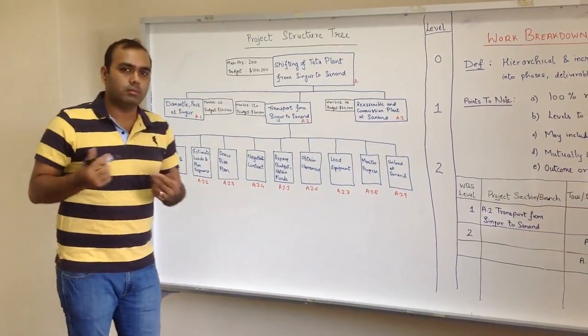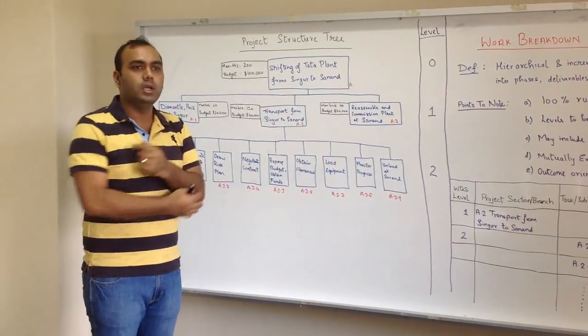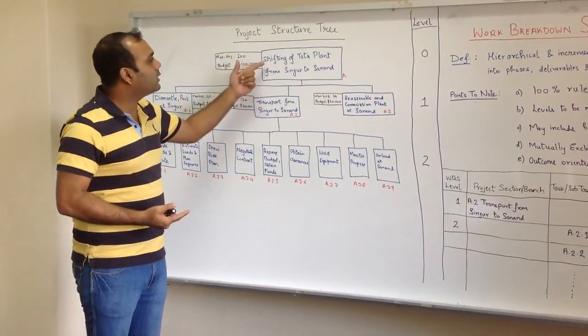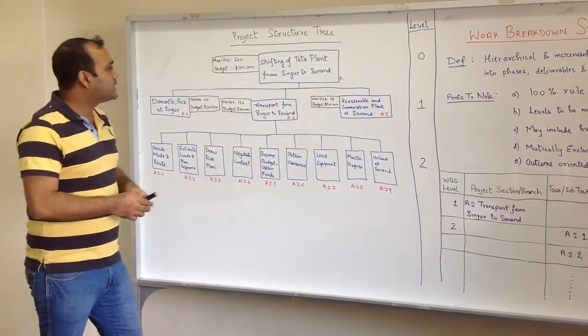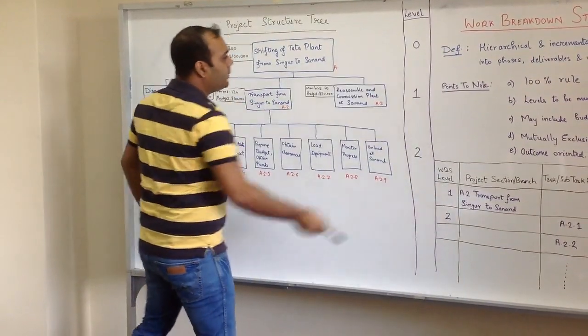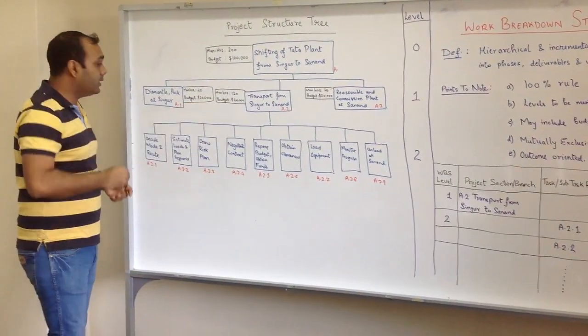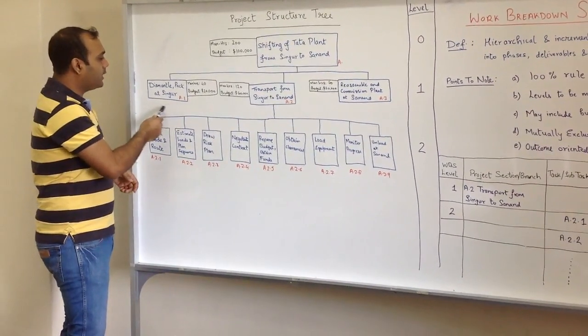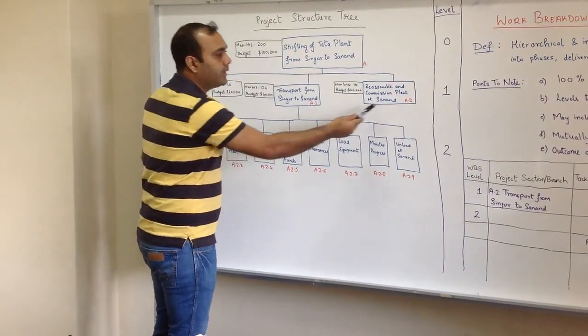Let's say the main deliverable of the project is shifting of a Tata plant from Singur to Sanand. You can see this is level zero, and I've broken it down into three outcomes: dismantle and pack at Singur, transport from Singur to Sanand, and reassemble and commission at Sanand.